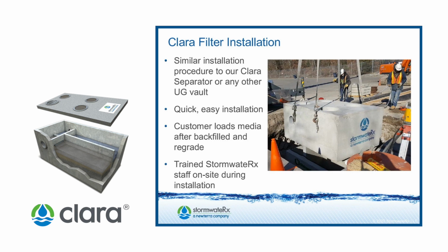We'd like construction activities to be completed before we load the media and commission the filter into service. That said, we'll have trained StormwateRx staff on site during the installations to assist the contractor and end user.